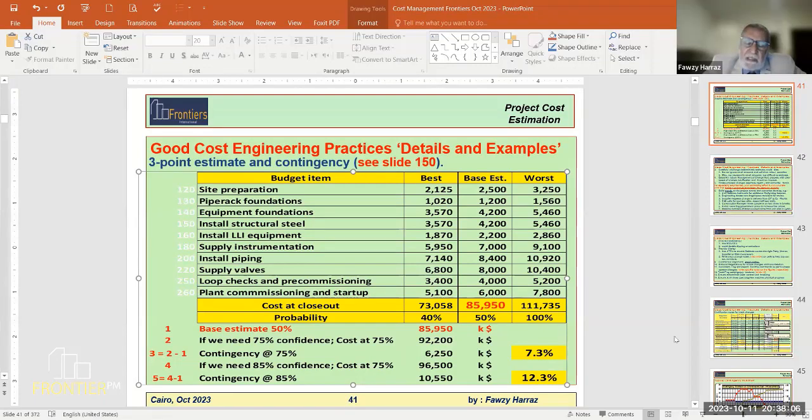I think normally the vendors respond to any budget inquiry and give you a figure and say this figure is plus or minus 15% accurate, so that when you make an actual order, you can expect the number to increase by 15% or maybe less within the accuracy range.